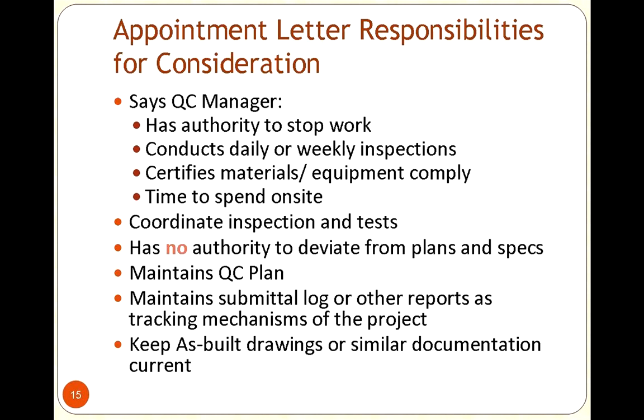And I'll talk a little bit later about some ideas about how to structure where you keep some things, but we always want to make sure that if someone said, we sent you something, that we had it documented of whether or not we had received those specifications or if UPS was still maybe holding on to them. In fact, back then I wish we did have the online tracking with tracking numbers. It would have made the job a lot easier back then. But we always kept a log that says we received engineering drawings for this mechanical room upgrade. Was some kind of a documentation number that was on there.